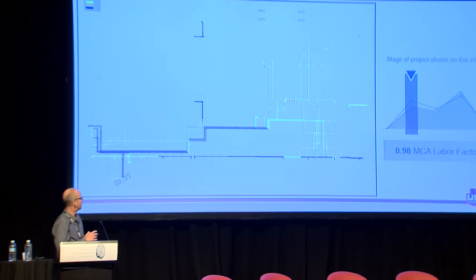Okay? So the power of this is I have one data point and I know we need to act. I would tell you, until we started having that information from the model, we would never have this at this point in time. We wouldn't have it. So before we had this from the model, we would have a project manager or even a vice president walking a job site, looking at what's been installed, and making an estimate of % complete on each one of our cost codes. Does that sound familiar to people?